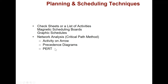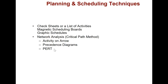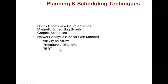There is rarely a definite duration to deliver any activity. If you ask a contractor how long excavation would take, you would get a time bracket rather than a definite answer — it could take anywhere between four to eight weeks based on variables including weather, delivery of material, or availability of machinery. Program Evaluation Review Technique (PERT) allows you to schedule your project when you are not sure about definite time frames.